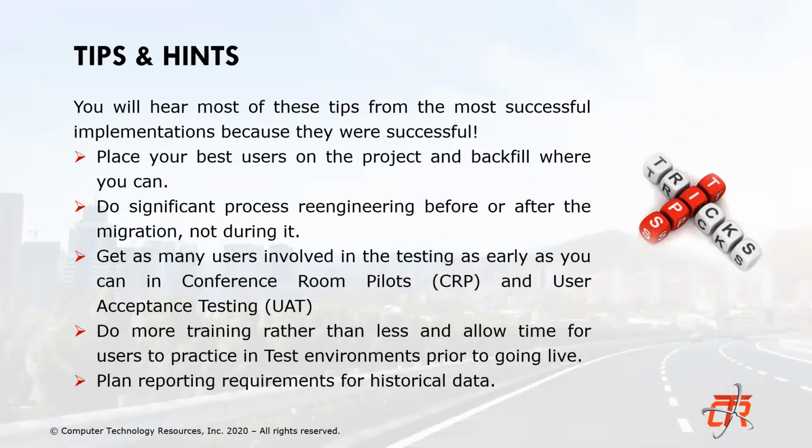Sure. Like we mentioned before, one tip is to get your SMEs, your subject matter experts, on the project. We had to do a little bit of backfill, so where we had maybe 10 people in the AP, we bring 5, or at least half the staff, into the room and leave the other 5 to do the day-to-day tasks. And they would take turns, so everybody got a little bit of the training as well. It wasn't the same 5 always covering, but it helped.